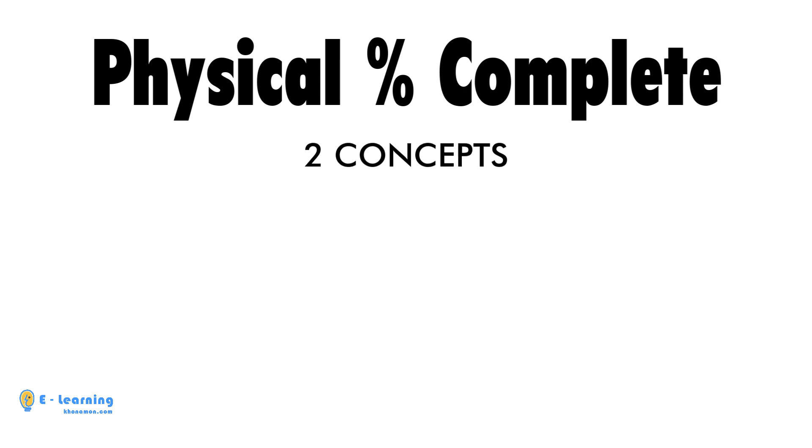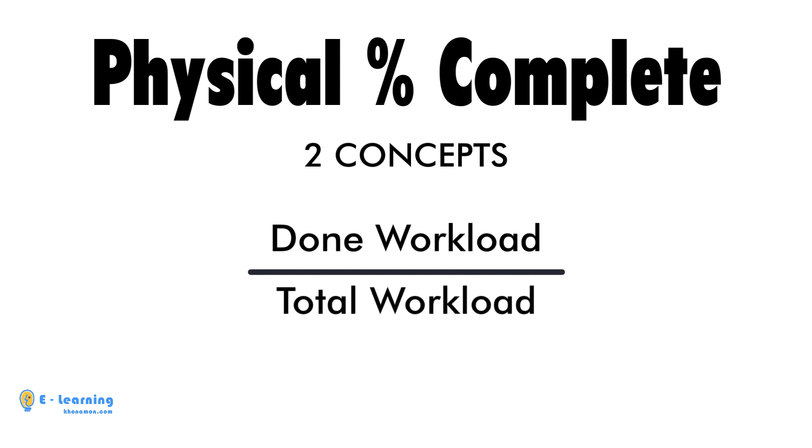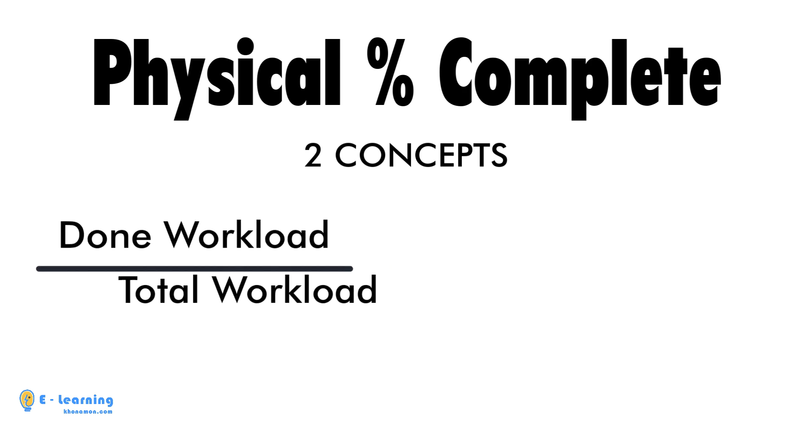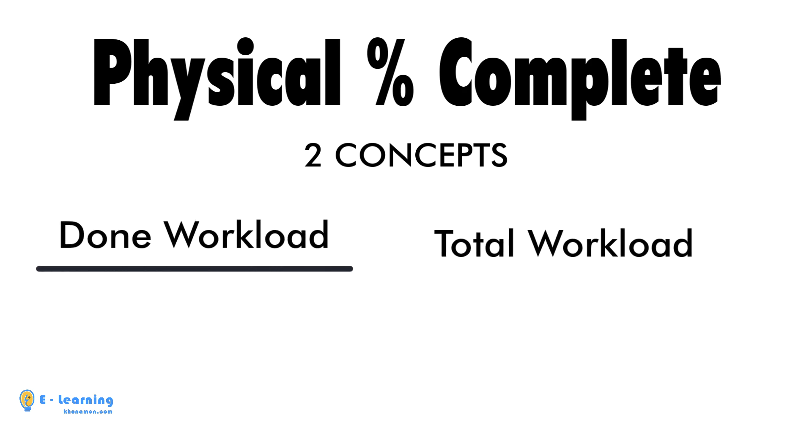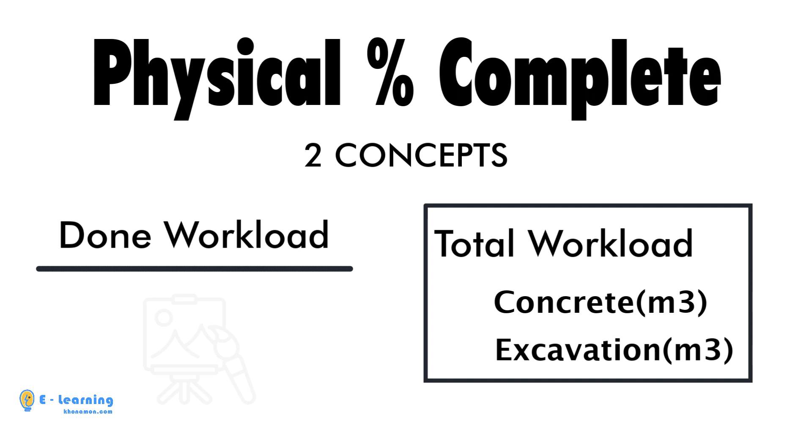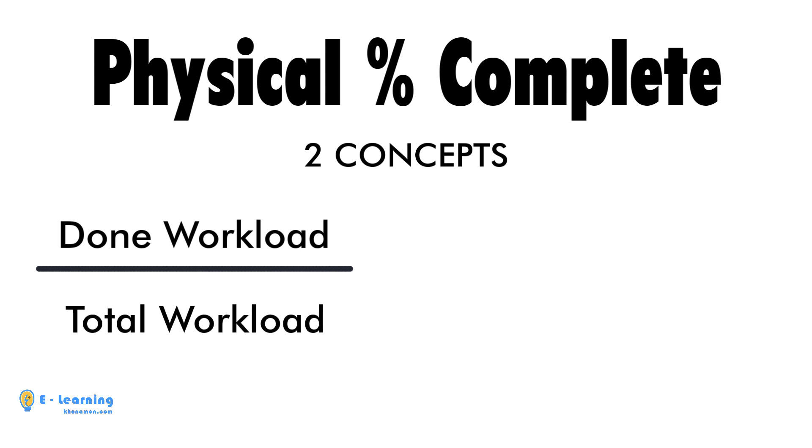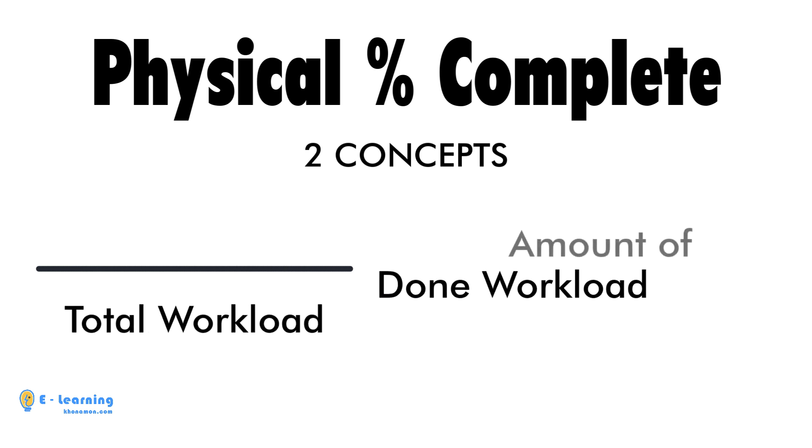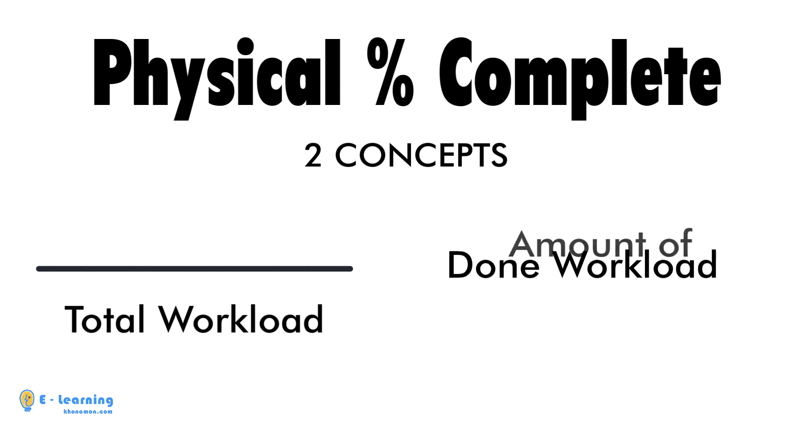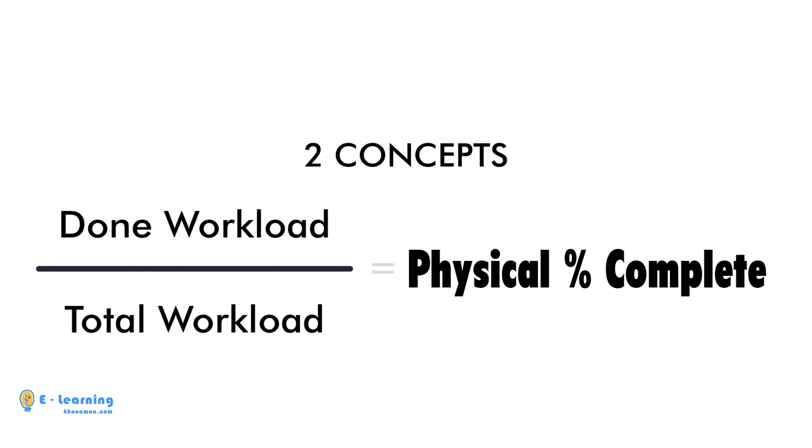Calculations based on the ratio of accomplished workload to total workload. First, the total workloads of the project like concrete, excavation, and so on are calculated based on drawings. Then, the amount of accomplished workload is calculated. Finally, the physical progress of the activity is obtained.